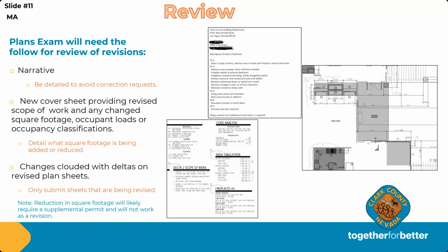All revisions shall be identified with a delta symbol and clouded on the drawings or resubmitted as a new project. Revisions completed the same day shall have the same delta symbol, letter, or number. It is the responsibility of the principal design professional to notify the building official, permit applicant, and the prime agency of all changes throughout the project and provide revised construction documents prior to the commencement of the work. We would like to approve your plans on revisions. We just need